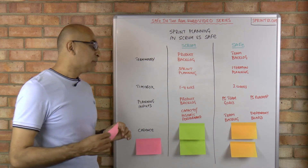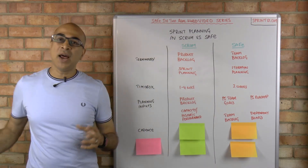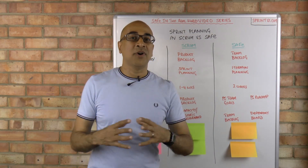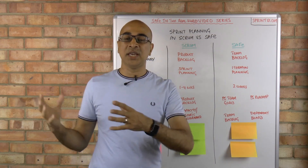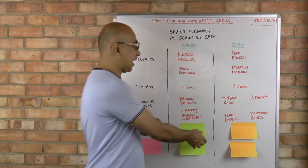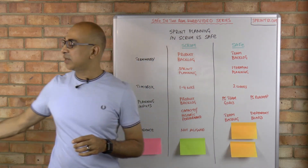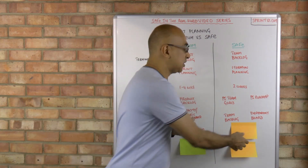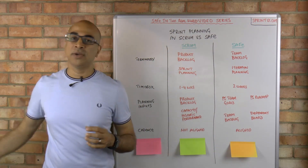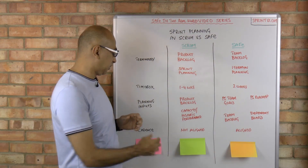The next difference is cadence. In Scrum we have the luxury of not having to worry about other teams and cross-team dependencies, so we can have our own cadence and we don't need to be aligned. Whereas in SAFe we need to have an aligned cadence.